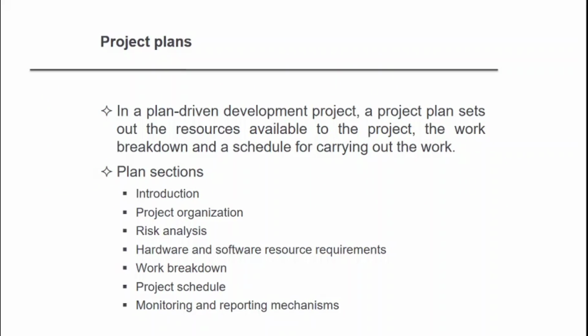Project plans. In a plan-driven development project, a project plan sets out the resources available to the project, the work breakdown and the schedule for carrying out the work. In the plan sections, you can see there is introduction, project organization, risk analysis, hardware and software resource requirements, work breakdown, project schedule, and monitoring and reporting mechanism.